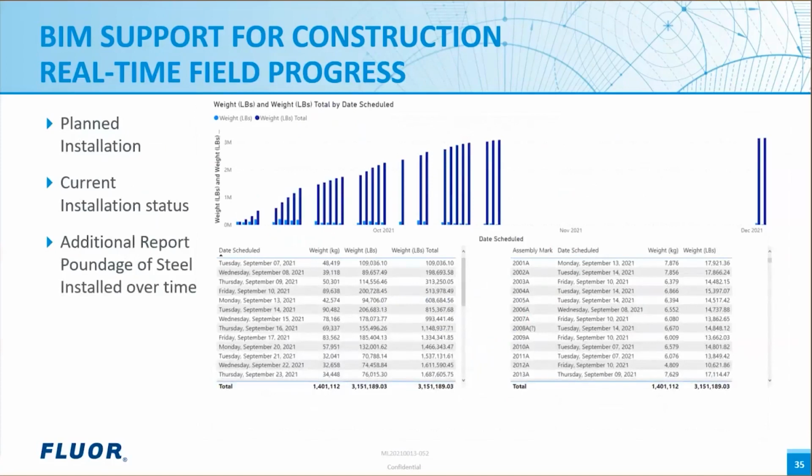The top curve visible in the dashboard is the erector plan to put up the steel, and the little bright blue space next to each bar is the daily installed amount of steel. The gap visible in the diagram schedule is the time between the completion of the steel structure of the building and the construction of the pipe rack after the completion of part of the investment. It's a kind of daily snapshot in relation to the previously planned schedule. This enables yet another view of the construction status and helps to make quick and smart decisions.